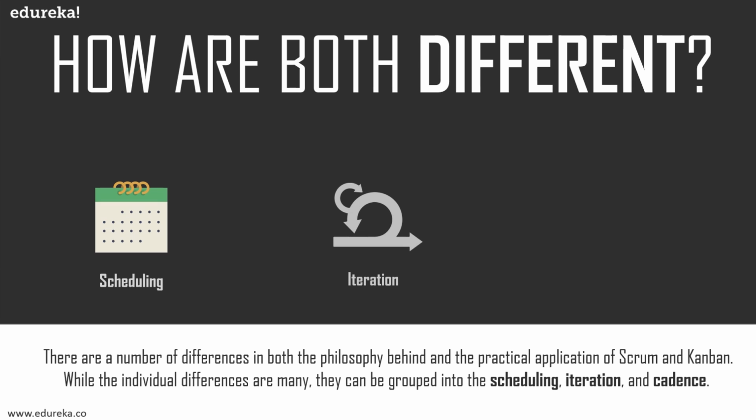Then, every 2 weeks or however long their sprint is, the team produces a shippable product, carries out a retrospective to discuss the optimizing of the process, and moves on to the next sprint. This iterative process is designed to allow for accurate estimations of workflow and effective management of multiple projects.